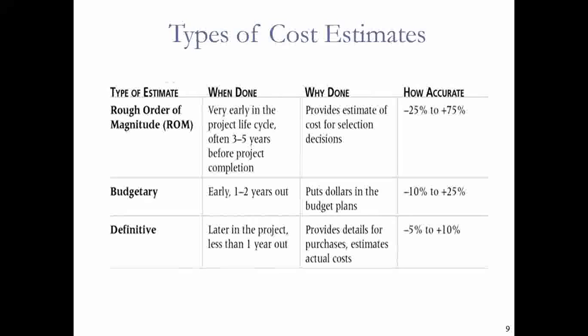The rough order of magnitude provides an estimate of cost for selection purposes, and accuracy is good because you plan well in advance before you commence. You can easily monitor everything and make adjustments and projections three to five years or more ahead. There is also the budgetary estimate, which takes a shorter period — just one to two years out. It puts the dollars in the budget plan, and is done shortly before you commence the project, as opposed to the rough order of magnitude which is done much earlier.